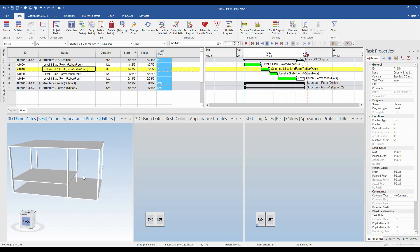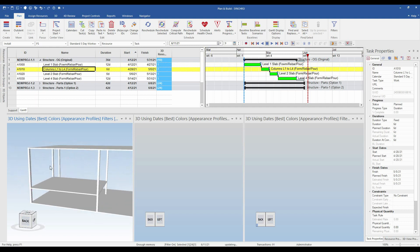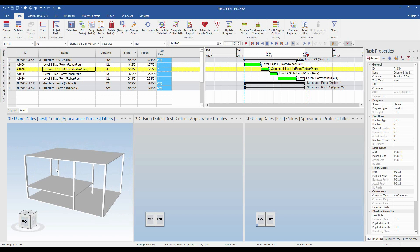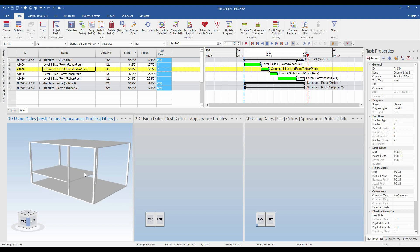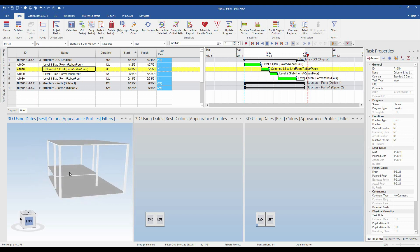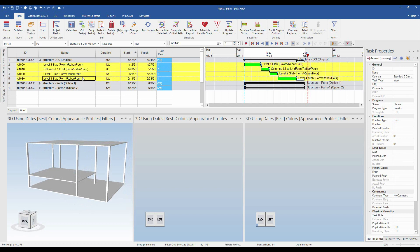Even if I click any of these columns, you can see they are going right from bottom to top, which is wrong. So we need to make some modifications to our models and our activities, because we need to model and plan the way it will actually be constructed.